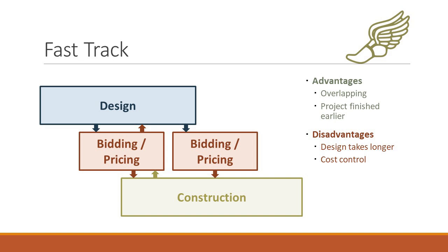The contractors are already actually looking at the stuff even before the RFP goes out, and we're going to get pricing during this period of time. And then they are not actually going to start construction right away. They're going to do pre-con services where they're going to review the 60% drawings, and from 60% to 100%, the contractor and the designer are going to work on making the designs more efficient, but they're going to give us a second bid pricing here.